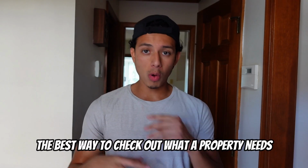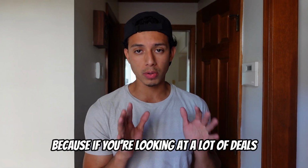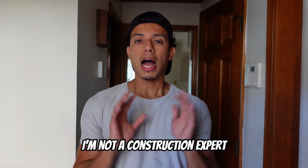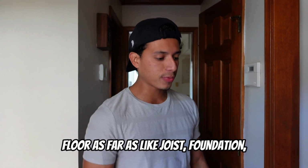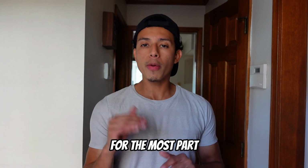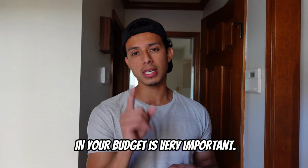The best way to check out what a property needs as far as renovations go is to walk it with your contractor. But if they're not available, because if you're looking at a lot of deals, they can't go out to every single deal. Personally, I'm not a construction expert, but I understand the big ticket items, right? So like roofing, floor, as far as joist, foundation, take a look at the crawl space. For the most part, you can catch things, but there's always surprises. So having contingency in your budget is very important.